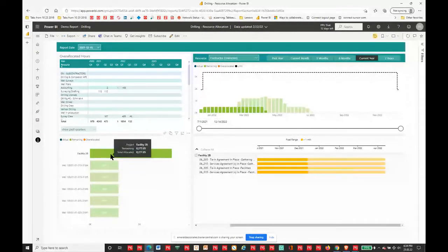Well, I've got all the activities that have that particular resource assigned, but not only that, I can see in this portfolio, this is the resource profile, and I realize there's no overloads, but it's still handy to know in the grand scheme of when that resource is required, where does your project sit? What happens, in other words, if I was in a scenario where something's getting delayed and it's going to drag out this resource, it can give you a high level view of, is there any wiggle room in there, or what exactly is happening? So if I'm looking at this particular one, facility 2B shows up in the profile here.